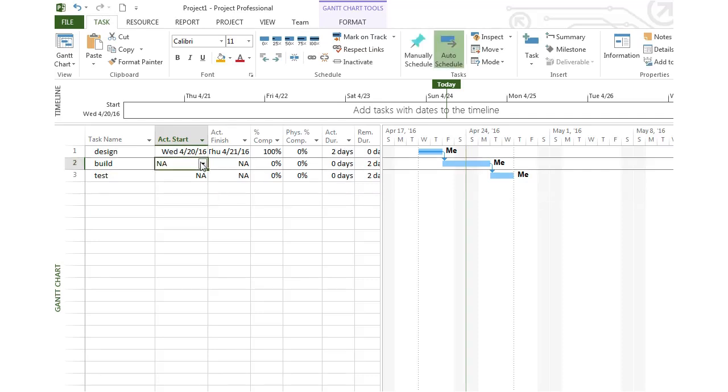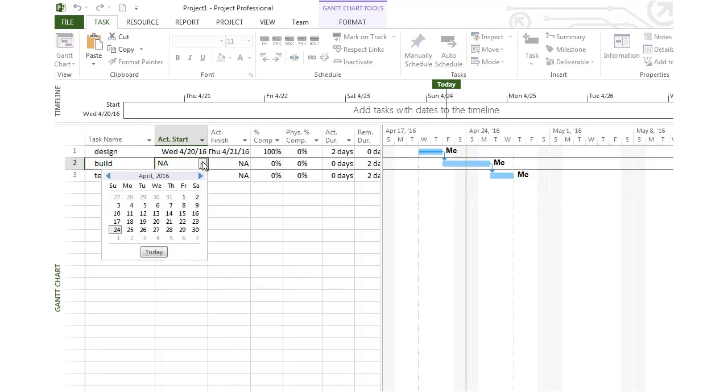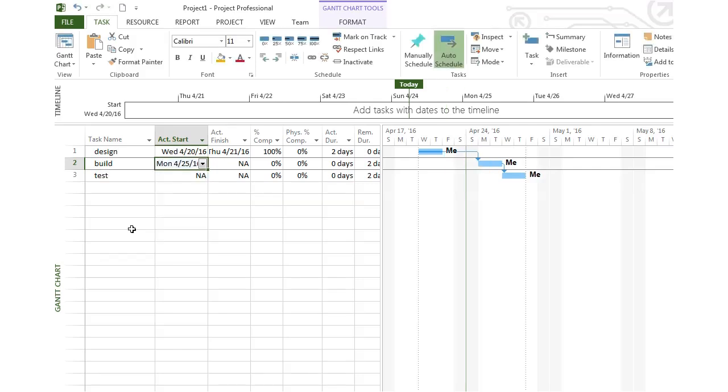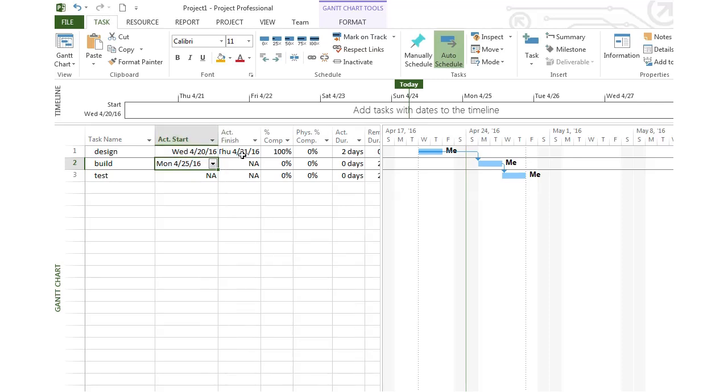So let's say for the build phase, we had estimated that we'd be able to start it right after the design phase. On the 22nd we'd be able to start, but let's say for whatever reason, it didn't actually start until the 25th. So I will mark the 25th as the actual start date. Notice that the bar moved over.